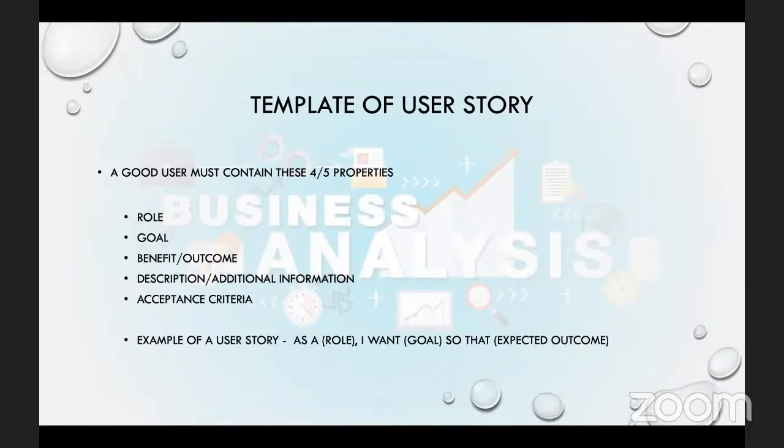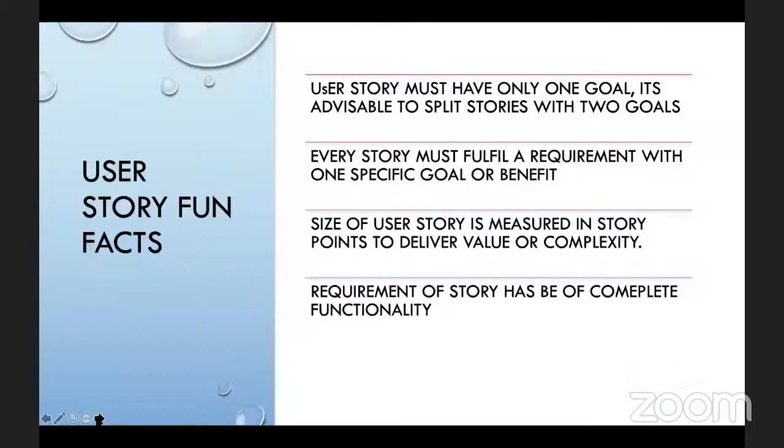All right, moving on. We can take maybe 2 slides or something, then we can get into the question zone. So user story, fun fact. I have something over here, very interesting. User story, fun fact. Something that you need to know, and also keep in mind as well. A user story must have only one goal, okay? A user story must do what? Must have only one goal.